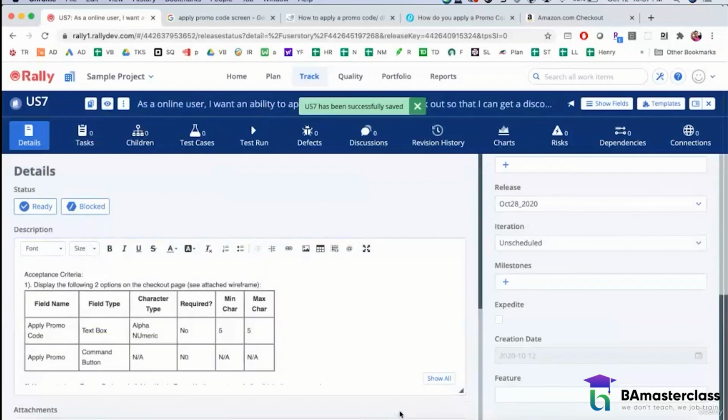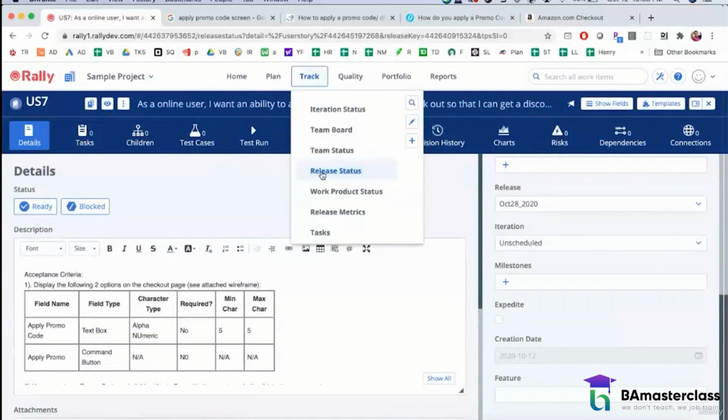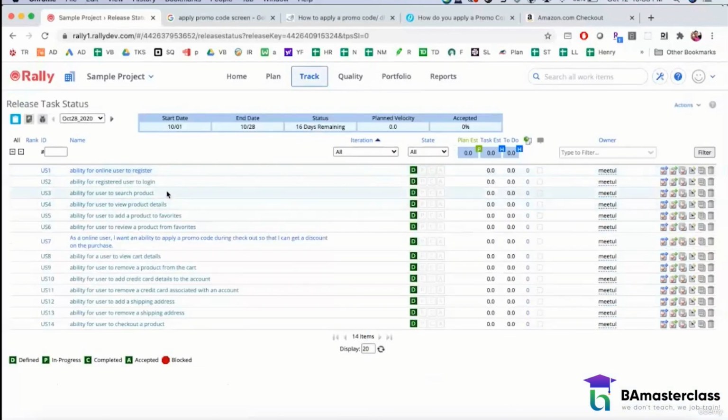So pretty much once you have finished your business prioritization meeting, if there are 14 items, you have to go and meet the SMEs, gather the requirements, and convert these backlog items into user stories. Now, the day one of the sprint, the first thing you have to do is you need to conduct a sprint planning meeting.